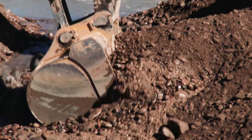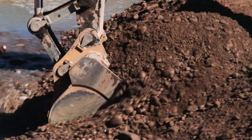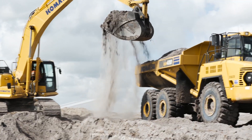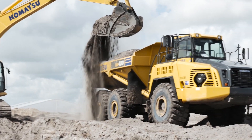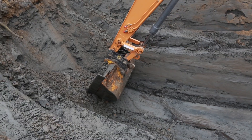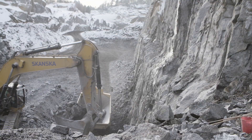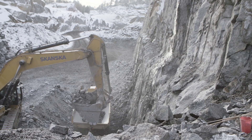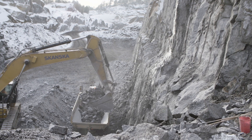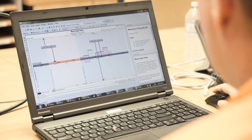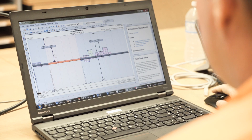One of the great advantages to using Dynarode is that you can consider different geotechnical compositions throughout the project. Sometimes you might encounter sand, sometimes hard clay, sometimes you're in rock. So your production rates are obviously going to differ.